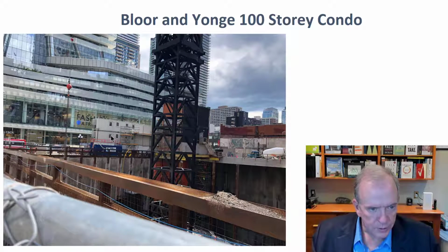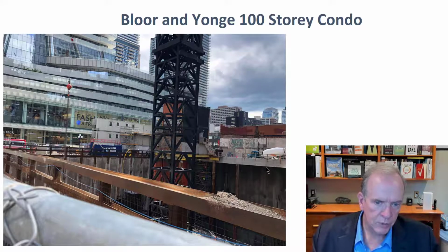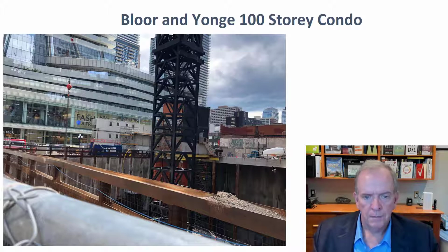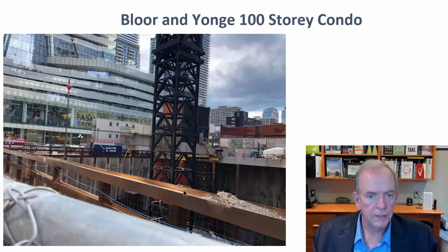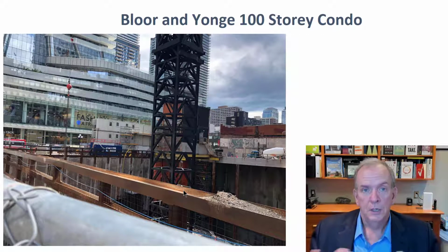Here, note the trailers, and underneath the trailers, you walk. So there's basically a sidewalk that goes underneath the trailers, and these are above ground. And here's a staging area for the concrete. So what they did was they put a ramp, and it's built on these columns here. And this is specially designed so that they can bring the concrete in and out, and either bucket it up or pump it up, depending on how they're deciding to do that. So it's very intriguing, because you've got to believe Young and Bloor, no space, really busy. So it's a challenging project, and it's a mammoth project.